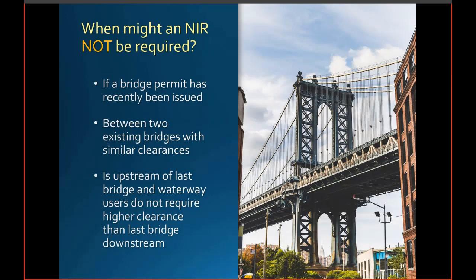It is not uncommon for District Bridge Office to not require an NIR. All right, did you follow me with all those negatives? More clearly, sometimes an NIR is needed for a particular project. The District Bridge Office may already have the required information for a waterway, either from prior bridge permitting projects or other Coast Guard activities. Even if an NIR is not required, the application materials submitted to the Coast Guard must still include information about the waterway's usage.